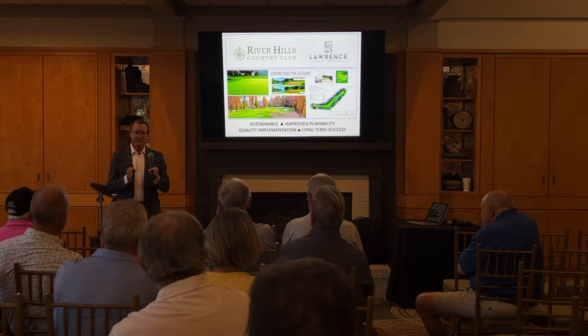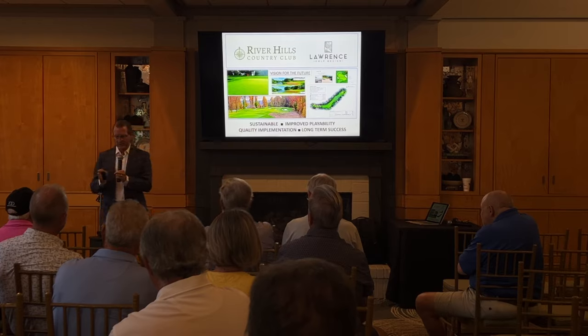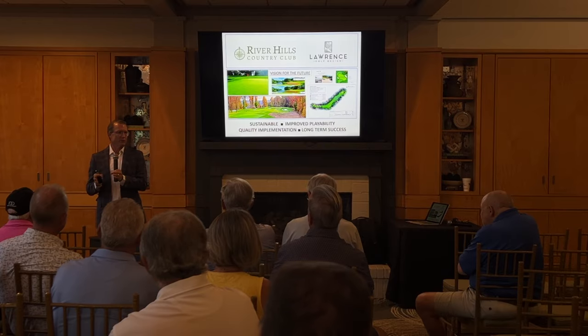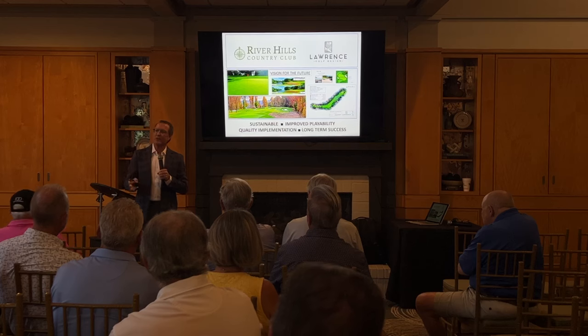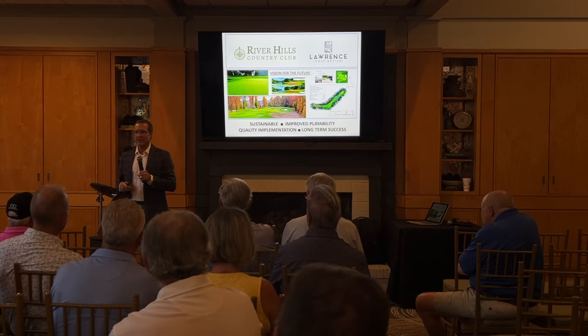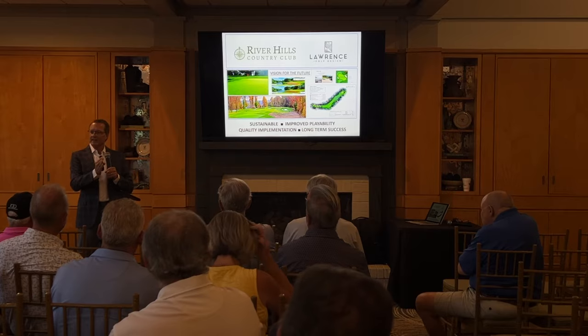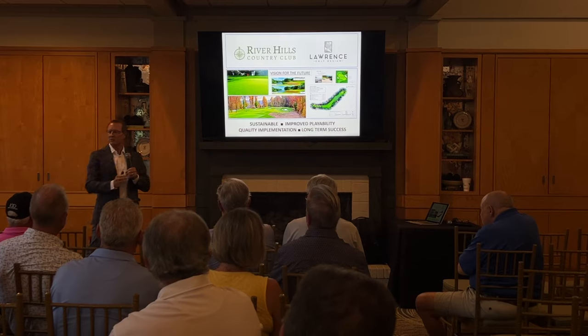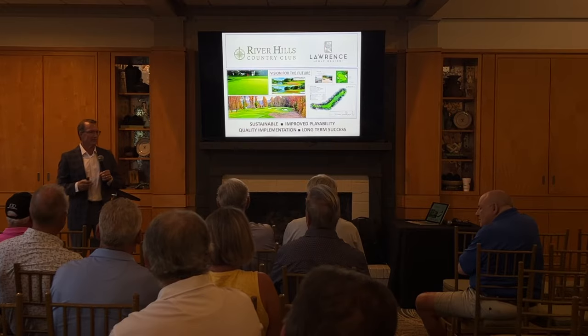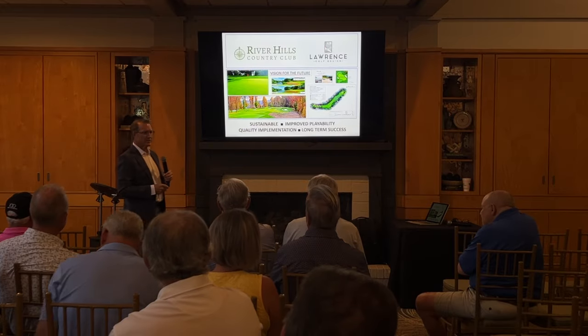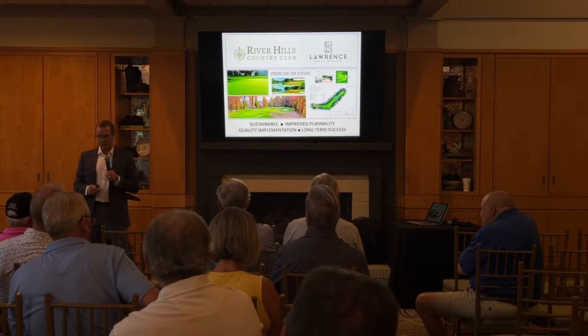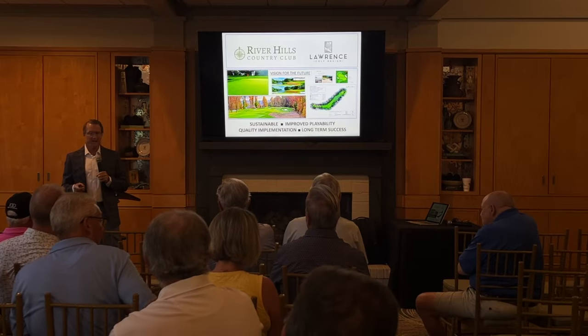The construction process depends on the scope of the work, then there's a growing process, and typically a growing process is a minimum of 3 months. So when we do schedules, we work backwards from the grassy window. Since you're in a warm climate, it's June, July, and August. Then you work back from your growing window to what your construction window would be, depending on whatever scope is chosen by the club. So that's how we came up with the time.